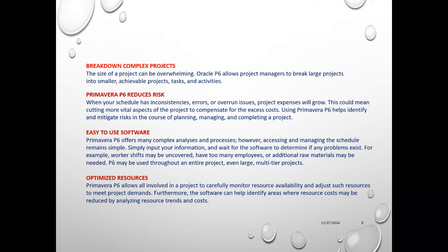It was a 5.73 billion program, a mega project. In the program, we had 4 towers, 2 car parks for 5,000 cars, plus the Abu Dhabi Stock Exchange building. We had 7 projects, and the overall value was 5.73 billion. We managed this through Primavera. We broke the complex program into project level, then into work package level, then into activity level.